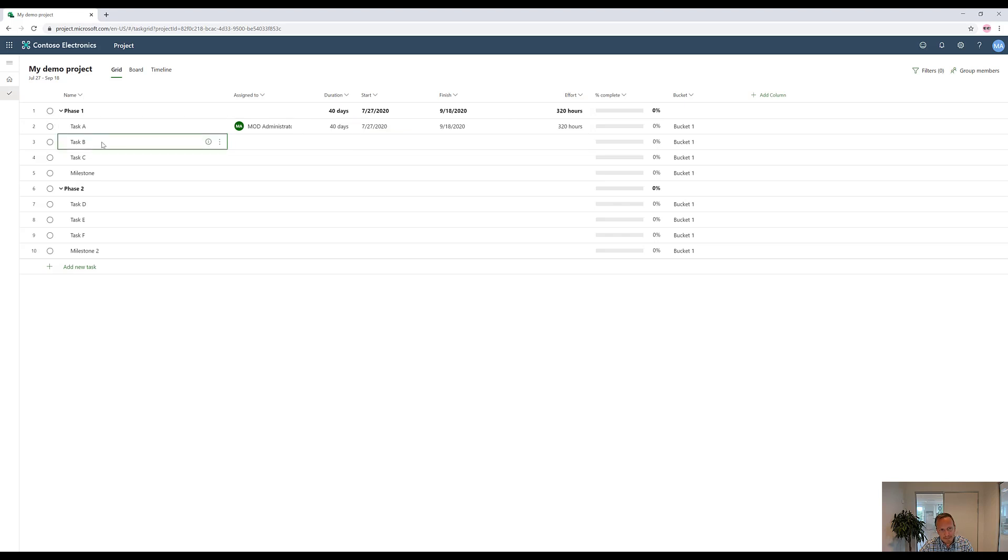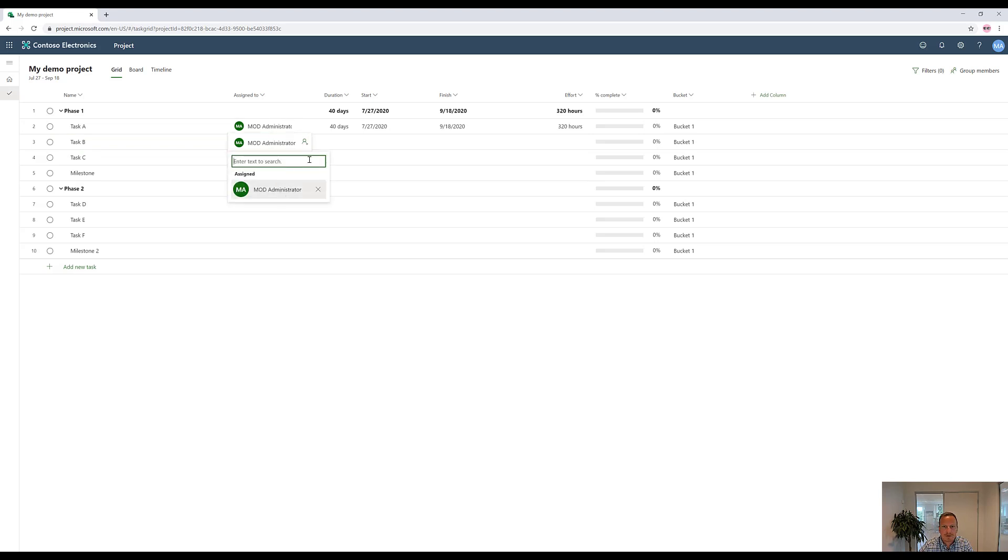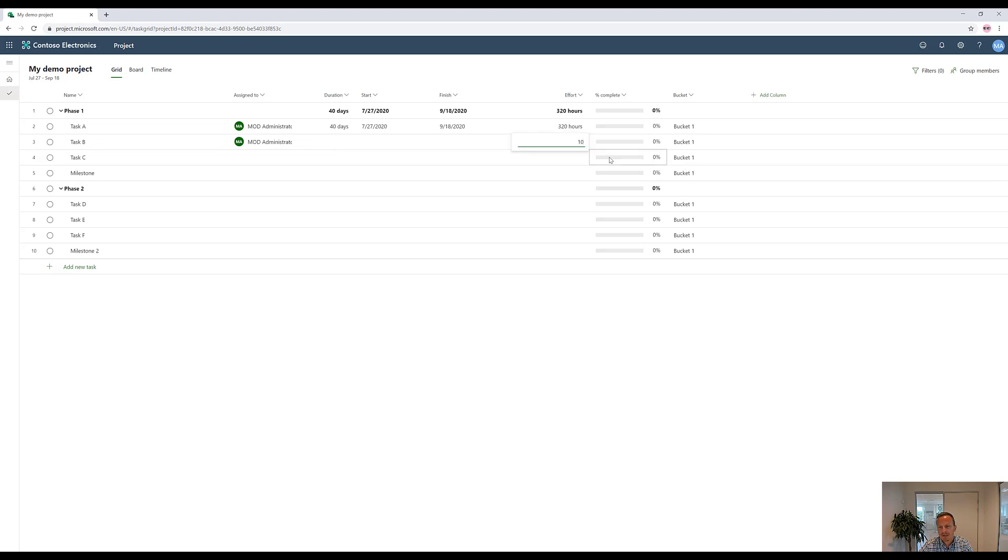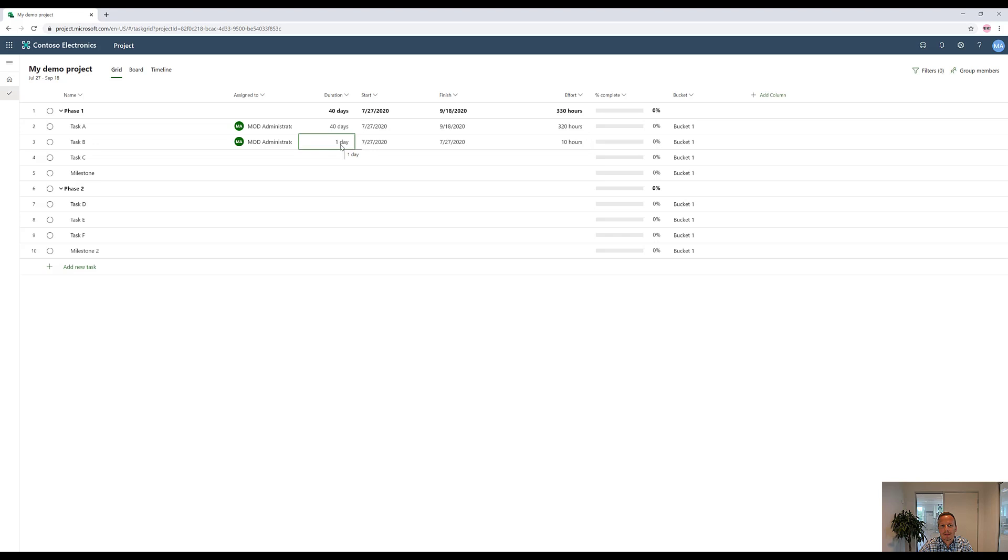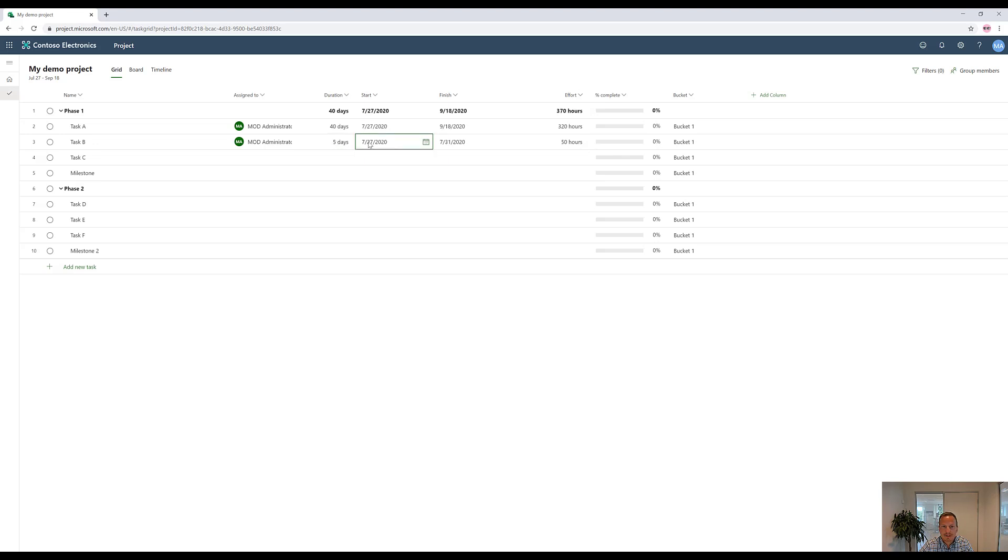But for this task B, I also want to assign the same person, but I want to control the effort myself. Let's imagine that you have a five-day work week, but you only want the person to spend 10 hours on the task. You have one task where you can spend 10 hours, but you can spend the entire week to do it. So 10 hours in this case, you can add here. Then if you click over on the duration part, you'll see that it just writes one day. The reason is that I started off by writing in the effort column rather than in the duration column. So now I can actually say that the 10 hours should be distributed over five days, like this.